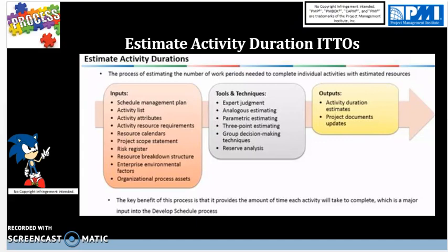So an example of a management reserve is where a manager has gone above and beyond what he gives the PM to manage the project. So as a manager, I have $15 million for a project that a PM is working on. I told them that he has $10 million to manage the project. So here, the management reserve, the extra wiggle room that you have, is $5 million. And you build that outside of the cost baseline in case something goes wrong.